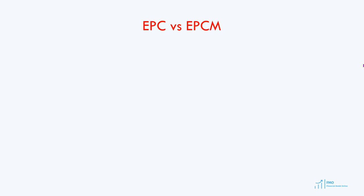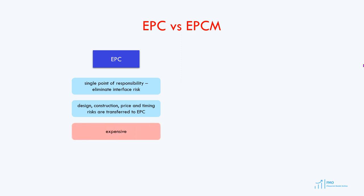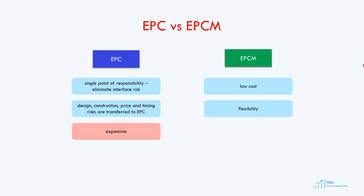In summary, the advantage of the EPC contract is a single point of responsibility, which eliminates the interface risk present when there are many contractors. All major risks are allocated to the EPC contractor. The main disadvantage of the EPC contract is its price — since the contractor takes on nearly all construction risks, it will include significant contingencies in the contract price. The main advantages of the EPCM contract are low cost and flexibility; however, from a risk allocation standpoint, the main risks remain with the project company.